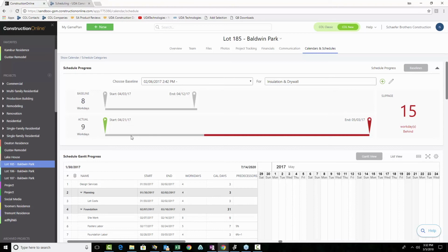I always want to improve the process, which means that we have to know where we slipped up a little bit. And in this case, with those baselines in place, it couldn't be easier. It automatically highlights all of this. It remembers everything that we thought we were going to hit, as opposed to where we're finishing some of these tasks now, which means the next time we work with this schedule, we can make the proper adjustments to give a more realistic expectation to our customers as we're working our way forward.